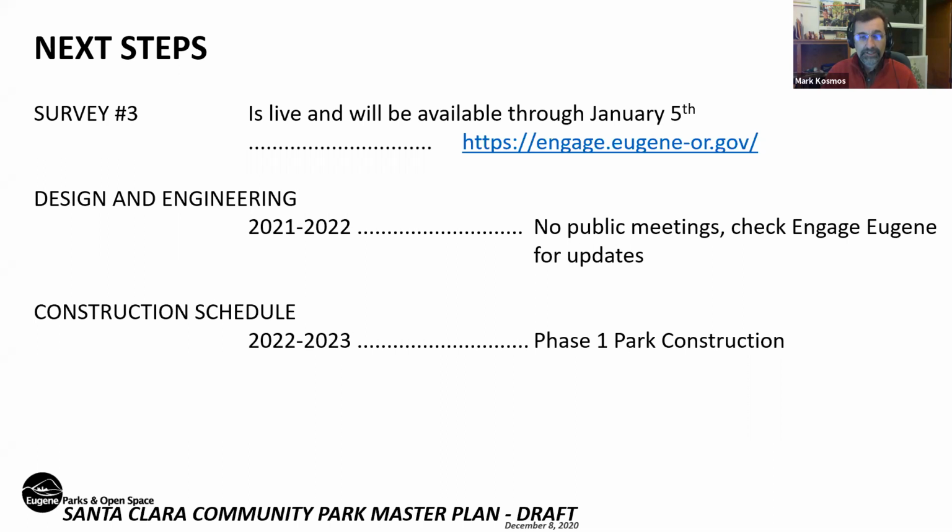The next year is going to be taken up with some budget validation, construction documentation, and engineering, design drawings, that sort of thing. Followed by that, in as early as 2022, maybe 23, we'll start construction on that phase 1, which should just be awesome.